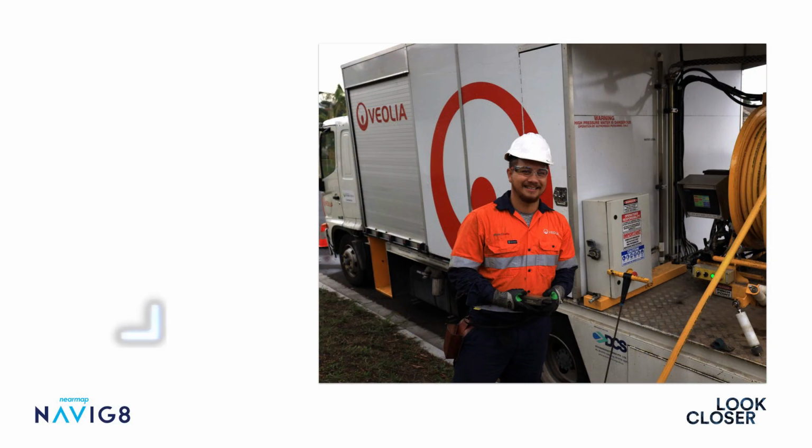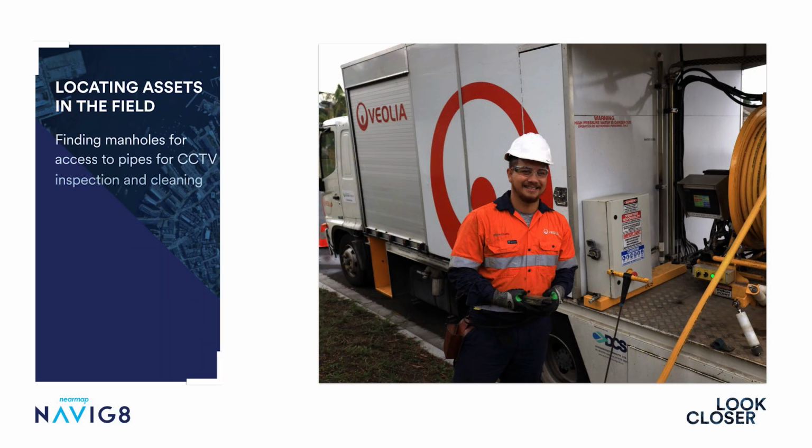In the next example, we had to do a CCTV inspection of a sewage pipe that was located in bushland next to a motorway. As this was government-controlled land, we had to submit a plan and show the assets that we'll be accessing.